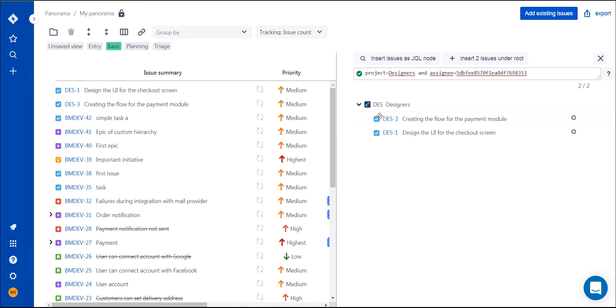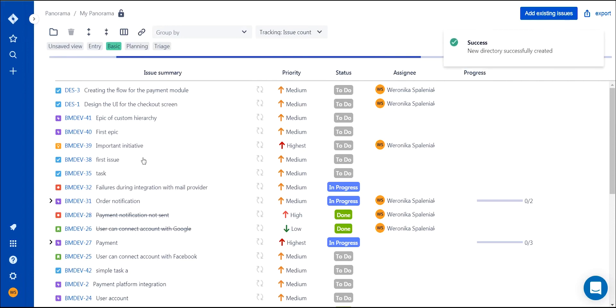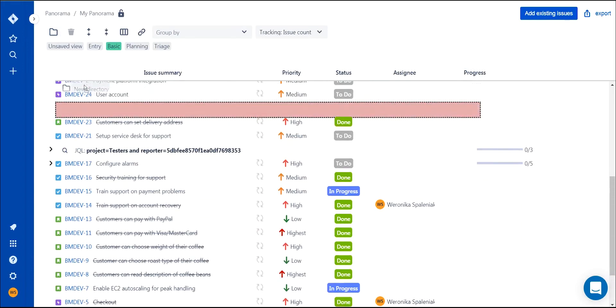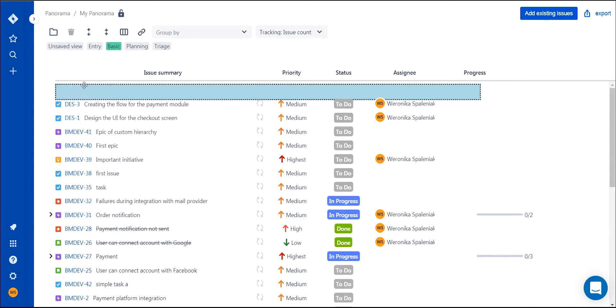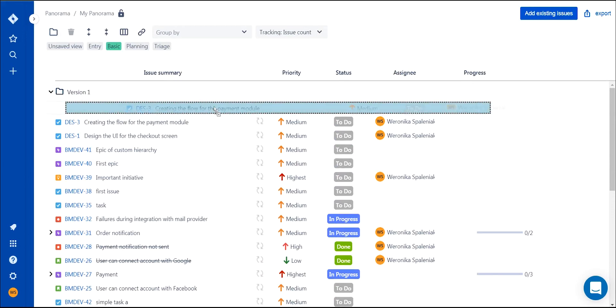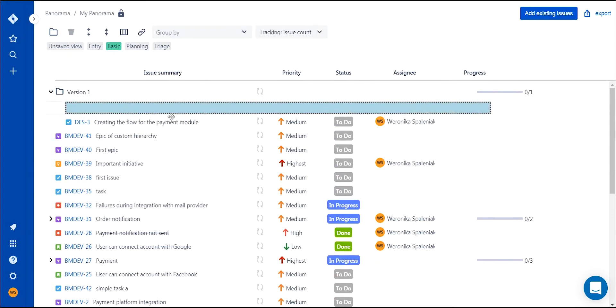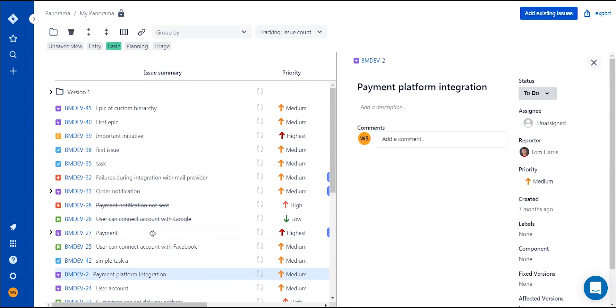With all the issues now added to panorama, you can structure them using tree hierarchy and folders. If you want to plan feature or version releases, you can create a folder for each feature or version, move certain tasks underneath them, and structure them however you like.